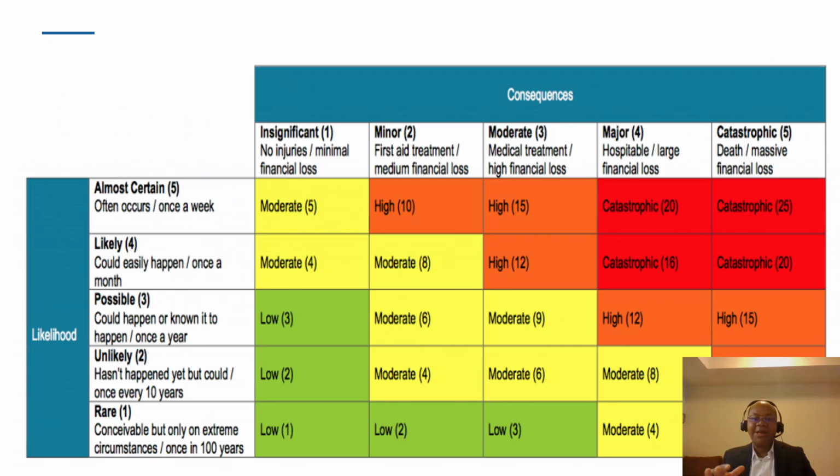So it makes it easy for you to be able to estimate the magnitude of a particular event. Let's assume a particular event has a likelihood of 2, which means the event is very unlikely to happen, but it might still happen though. It's given on a scale of 1 to 5, and is given the number 2.